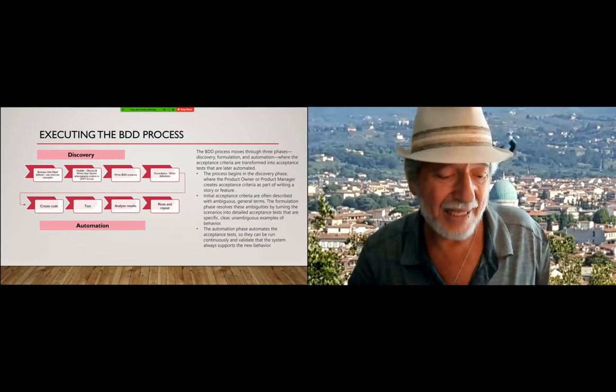So when it got into the backlog for sprint planning or iteration planning, the acceptance criteria were already provided as BDD scenarios. And that took a lot of the work and time off the developers, and they became a lot more efficient and productive. So that's what I really love about BDD.